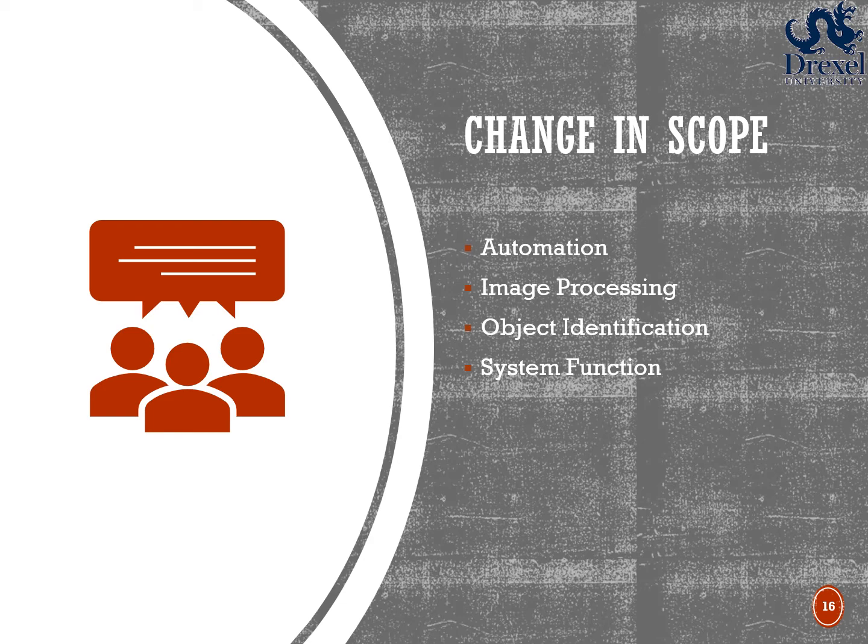A large helium balloon was planned to be used during the final stage to carry the whole system in the air while floating freely. However, the coronavirus pandemic forced project testing to stop before integration of all the individual parts into a whole system. Because of this, the team changed the final system function expectations of the project from a single integrated system to each individual part successfully working independently.